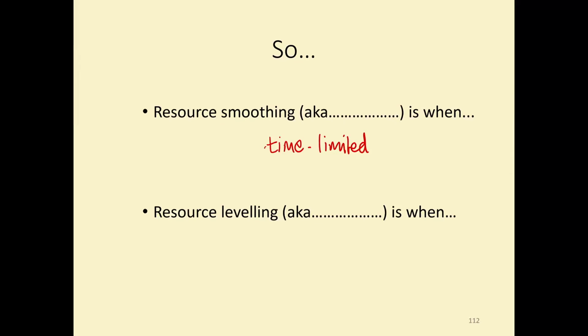Because that's what we're doing. At this point, we're seeking to optimize the number of resources, right? The resource availability, chopping off the peaks, filling up the troughs. One of the other options for us was utilizing overtime. If there wasn't enough float, we could utilize overtime. That's effectively getting more out of our people, isn't it? So we could work weekends or whatever.